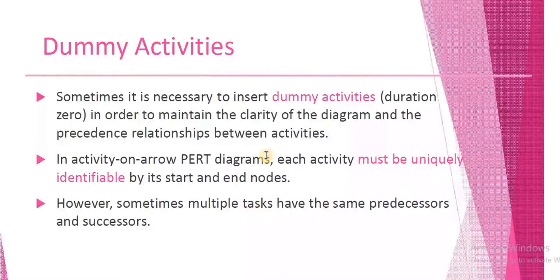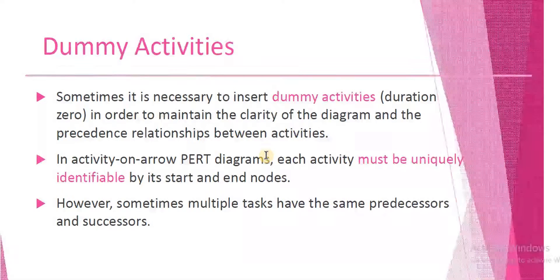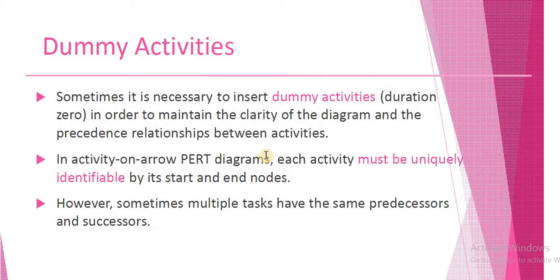A dummy activity has a duration of 0. It is used to preserve the precedence relationships between activities. In activity on arrow diagrams, each activity must be uniquely identifiable by its start and end nodes. Sometimes multiple tasks have the same predecessors and the same successors.